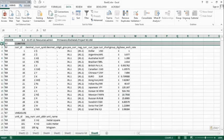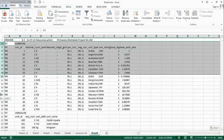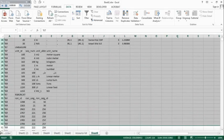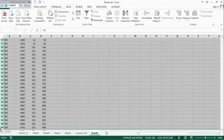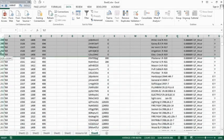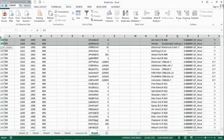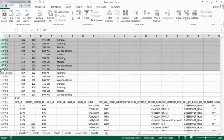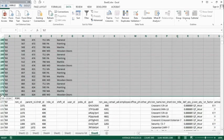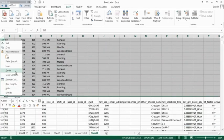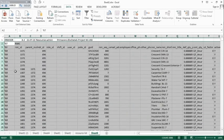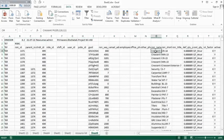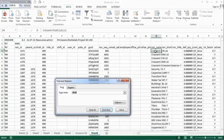We now have all the information about the resources loaded on the Primavera program in an Excel file. We are looking for the three resources which were named after the project, as explained in the first step. We can now delete unwanted data and keep only the three resources that were created in Primavera.